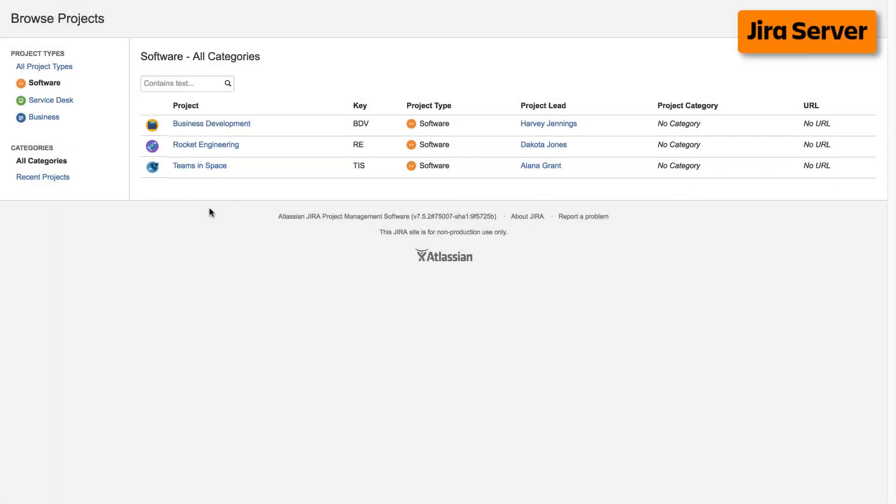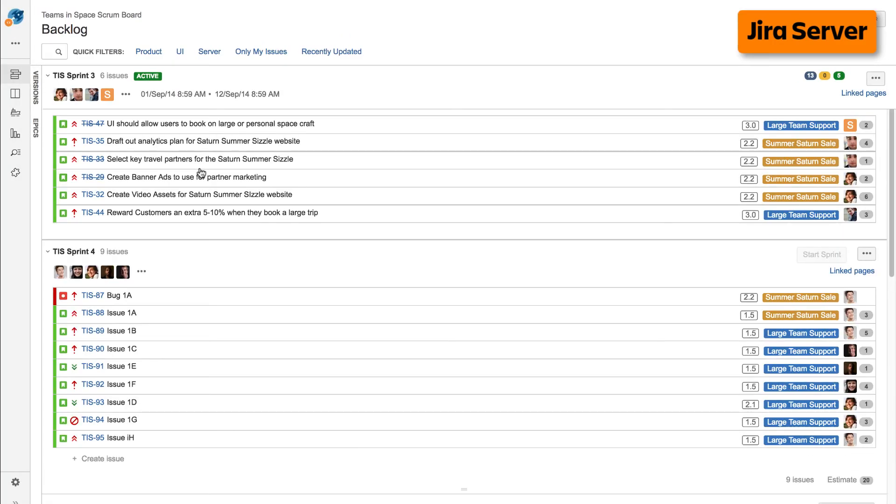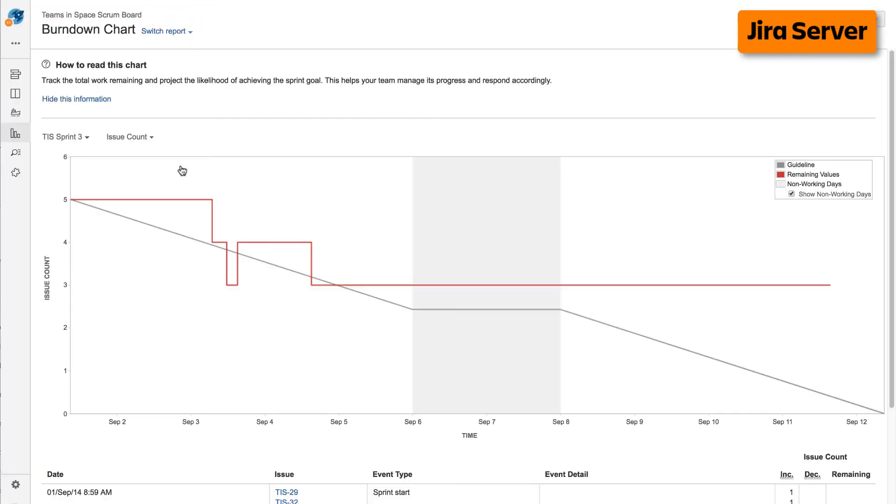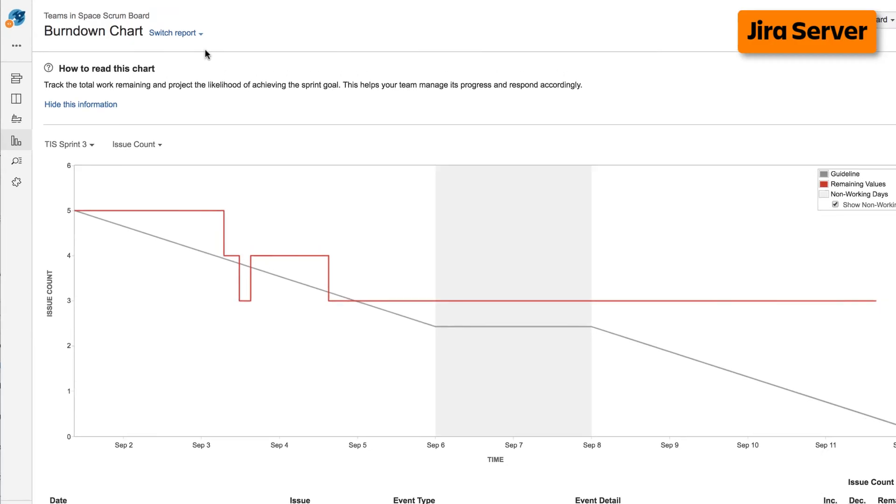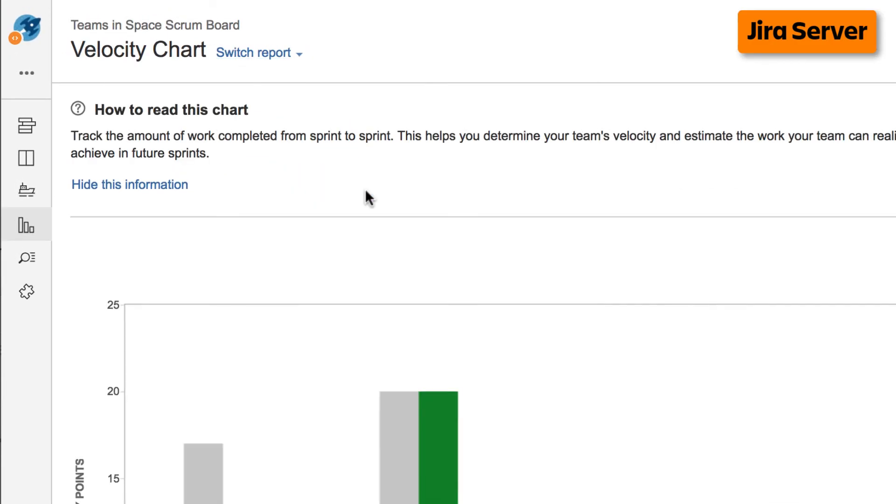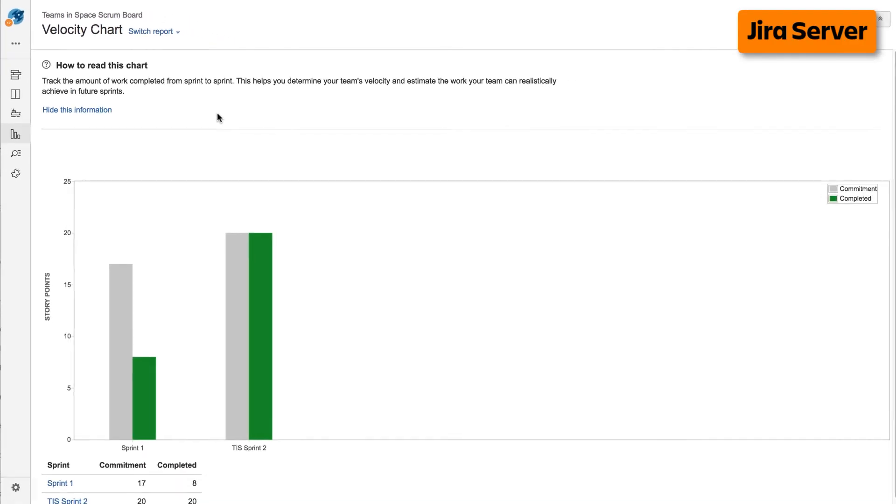To access reports on the server version of Jira, navigate to your desired project, select reports from the left taskbar, then select the desired report from the Agile Reports display. If you're already viewing a report, you can select a different report from the switch report drop-down.